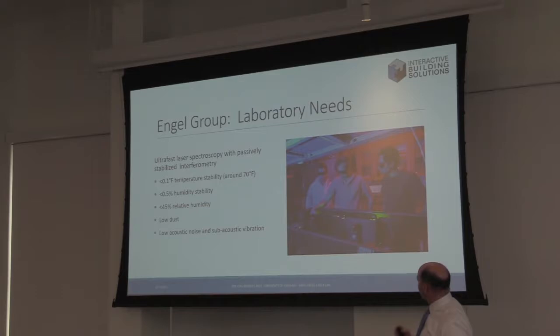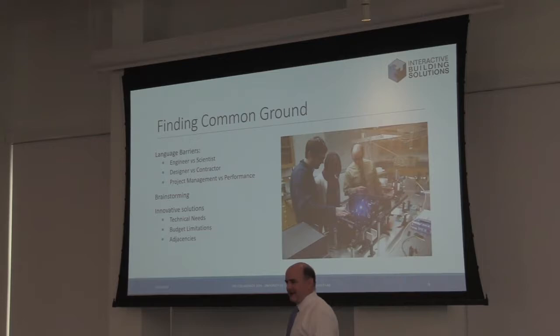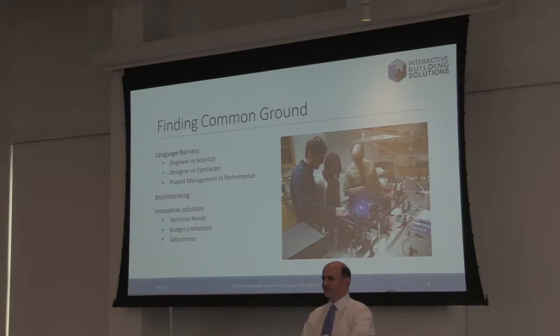Now, what's it take to get there? And I think when I look around at my colleagues around the country, where do people fail? It's always in communication. The issue is always one of communicating the right things up front when you define the project, making sure the design team really understands what's happening. The handoff between the design and build is often a mess, and this is the one that keeps faculty up at night, because when you get to commissioning, which is often a third person yet, and something doesn't work, the answer you get is this. You know, the contractor says, well, I built what was on the page. And the designer says, well, my design was perfect. And the faculty member sits there and just looks at their watch and thinks about their tenure clock and goes home and cries.